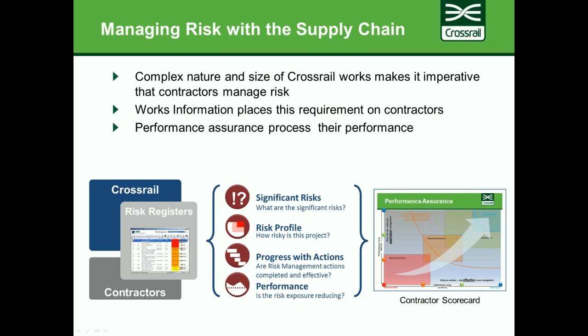It's important to get the process common, because although risk management is fundamentally a simple process, there are many different flavours and varieties. So we felt it was important to mandate an approach through works information. And we also put in place performance assurance to assess their performance. And we did all this around our risk database.